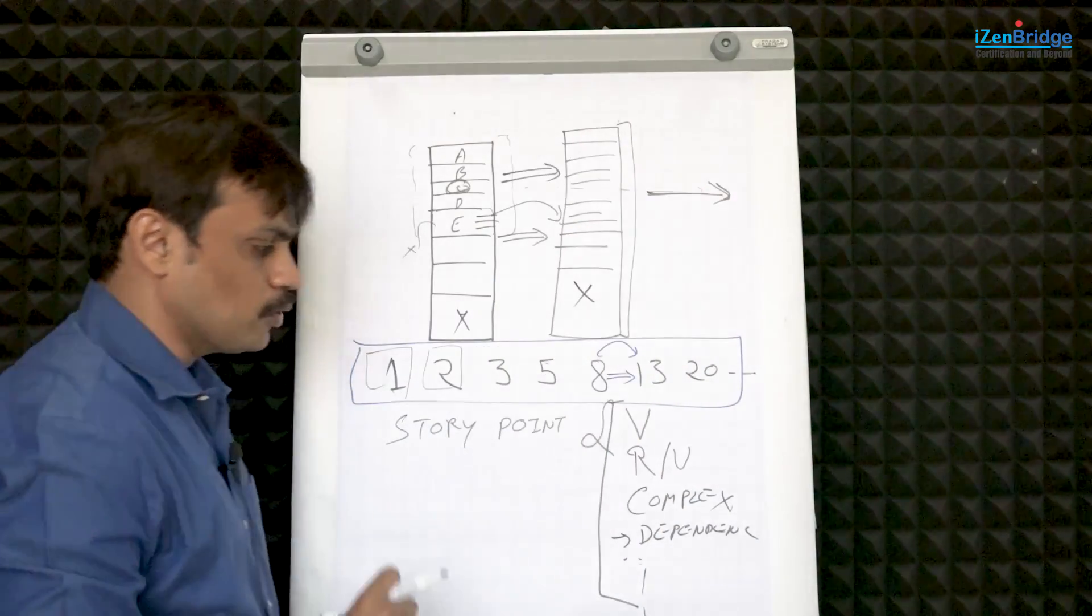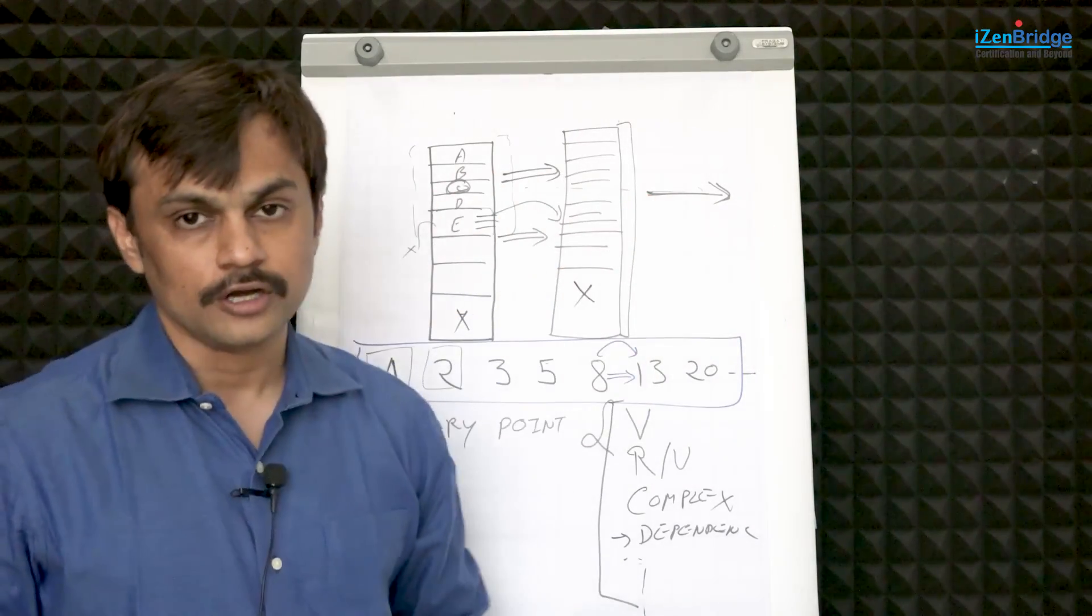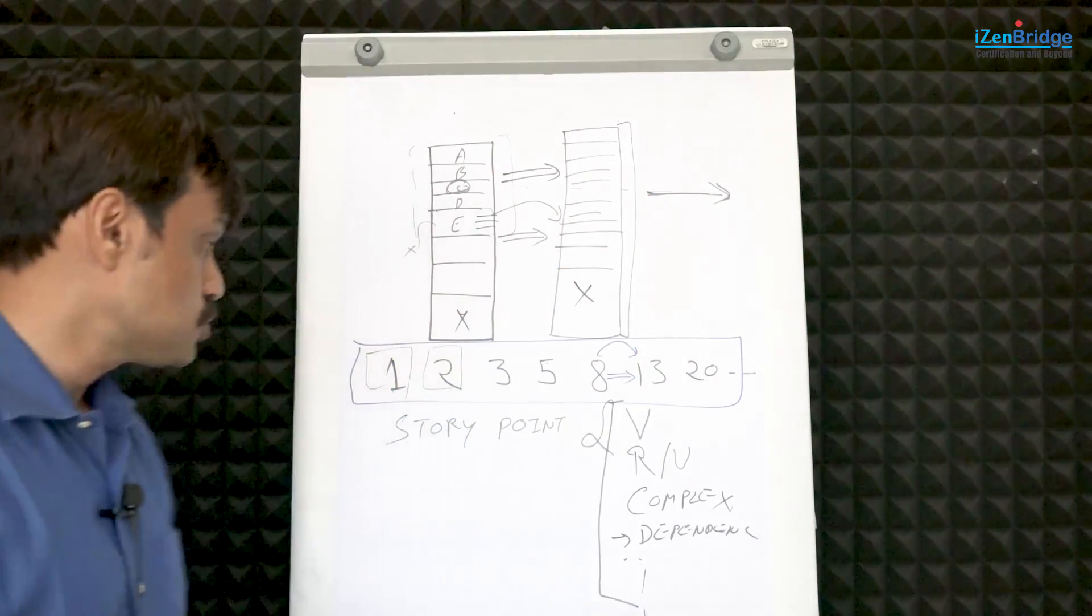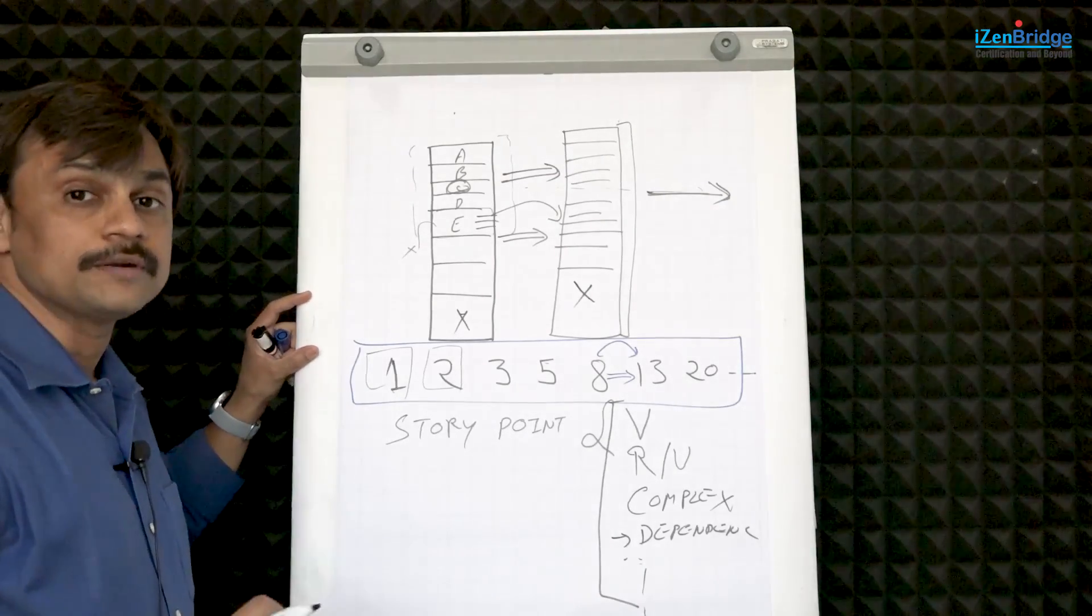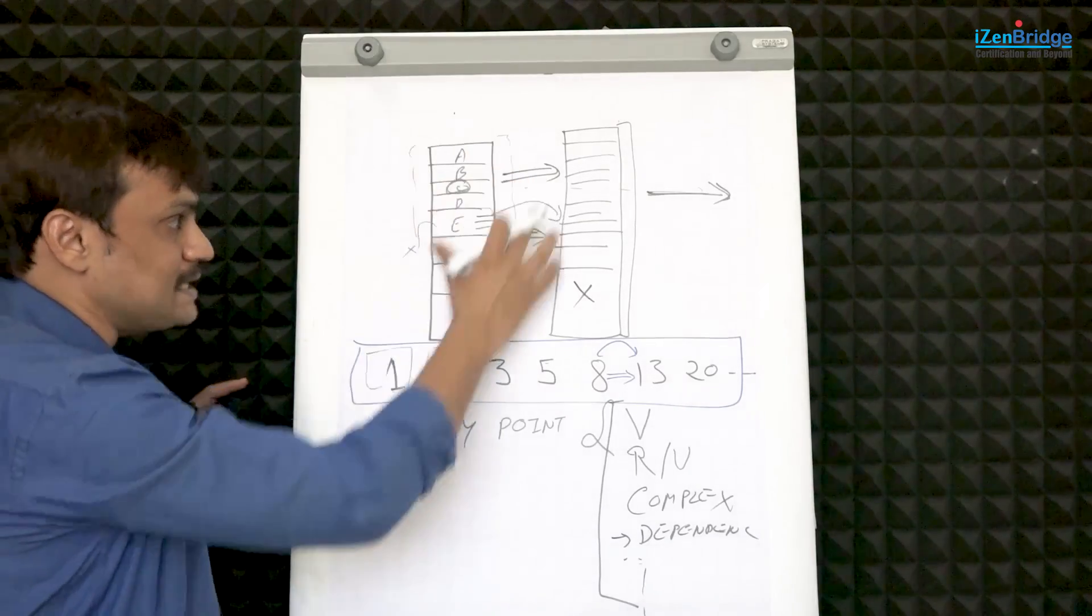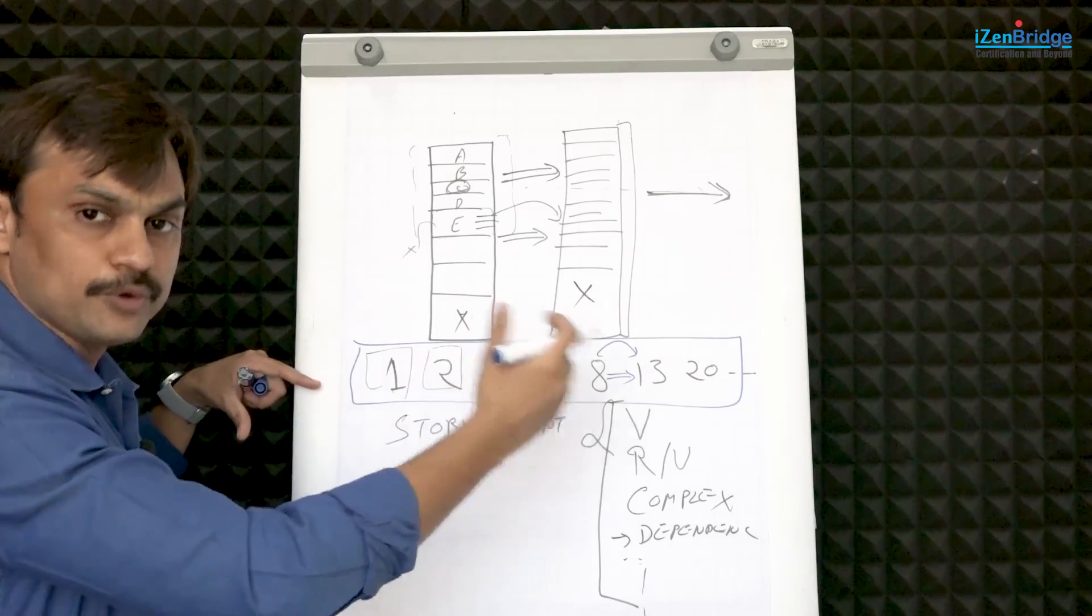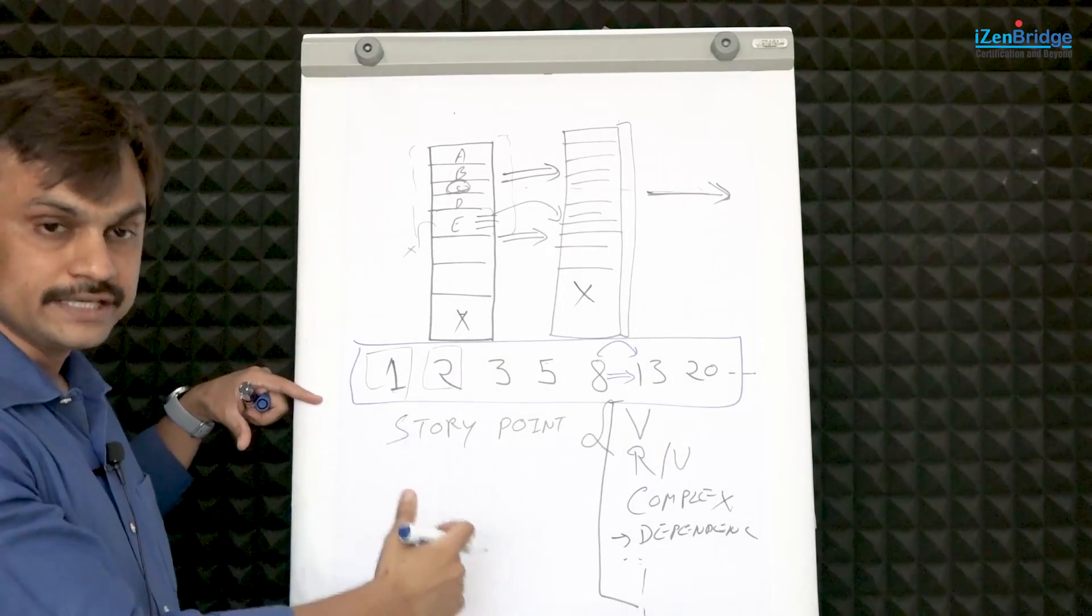So if I summarize, story points are absolute numbers. They are not representing days, hours, or anything. They represent the sizing of the product backlog items which are lying in a product backlog. We use a modified Fibonacci series which gives us non-linearity in the system.